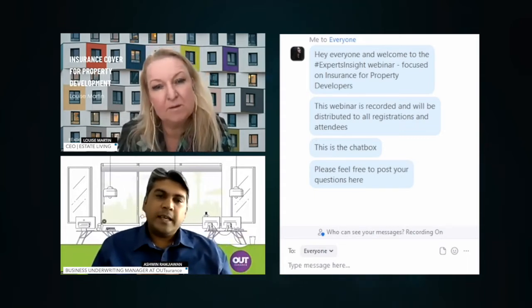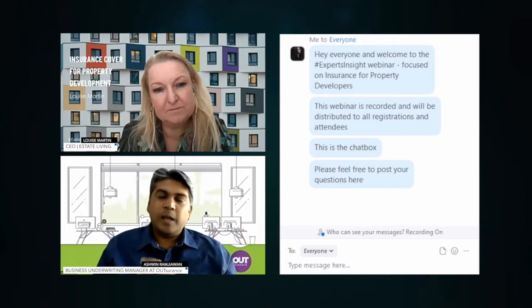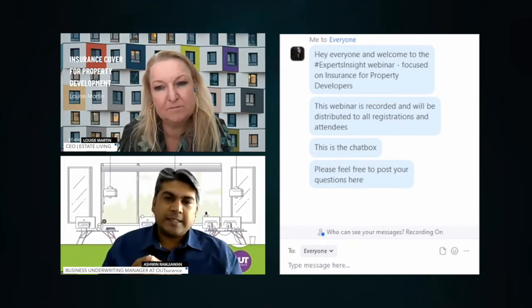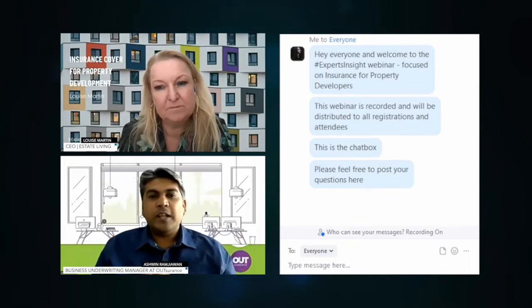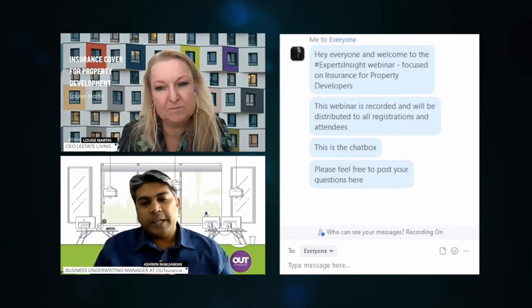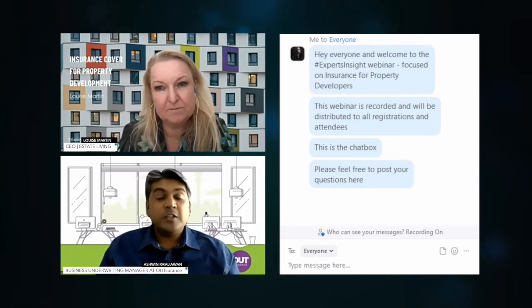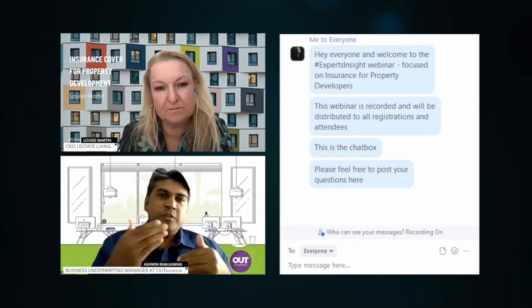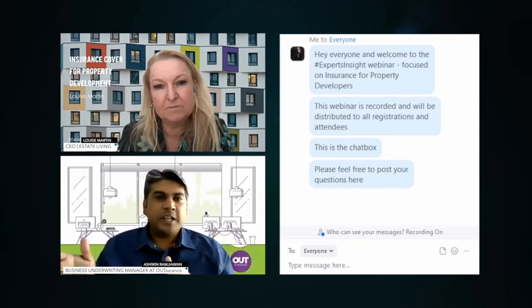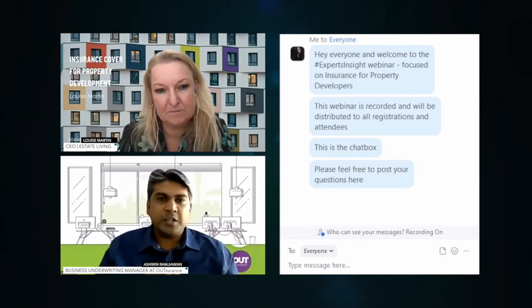When the insurer would underwrite that contractor, they would need typical information like your bill of quantities. The building contractor would be very familiar with that. Construction schedules, when you get on site, when the foundation starts and how that contract will actually progress.